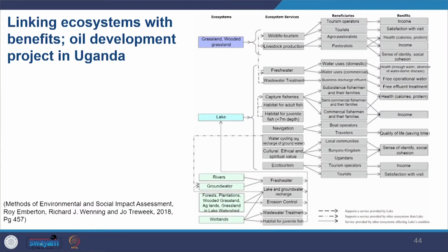You will also have to identify possible links between ecosystems and users. So you need to look at the links. This will allow you to identify particular benefits that users take from these sources. So that link would help you to identify the benefits and the beneficiaries. You can take this information from secondary sources. So looking at other reports might help you to process this information. You may also have to undertake specific baseline investigations if required. So if secondary data is not enough, then you might have to undertake a baseline investigation.